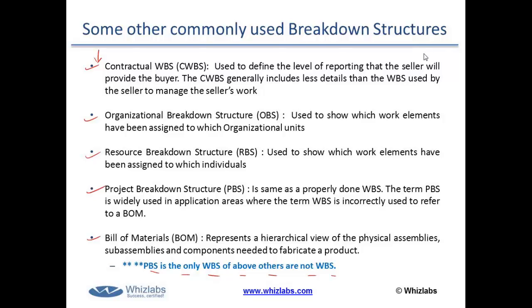So I can say it this way that the resource estimation is not yet done at this stage when you are creating the WBS, right? Also, the time estimation and the cost estimation are not yet done when you are creating the WBS. What you can do as a best practice in project management, you can document the resource allocation, the duration, the dependencies, etc., within the WBS dictionary at a later stage as and when they come up.